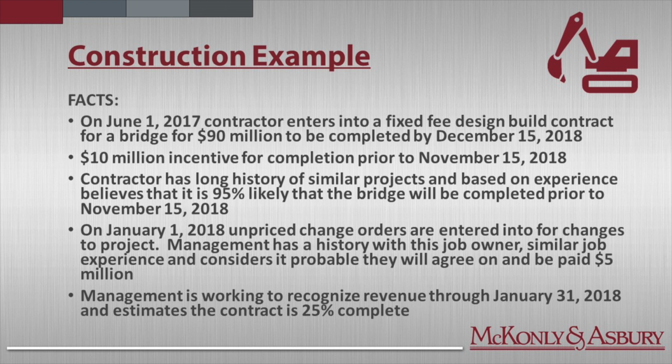And to go just a bullet point ahead about the unpriced change orders, I don't typically see a lot of unpriced change orders. Most of the change orders, especially of this size and scope, are usually agreed to with a dollar amount before the work started, and I agree that's a best practice. However, throughout the guidance and even in the literature from FASB, there's constant reference to unpriced, so I wanted to make sure that we address that in this example.